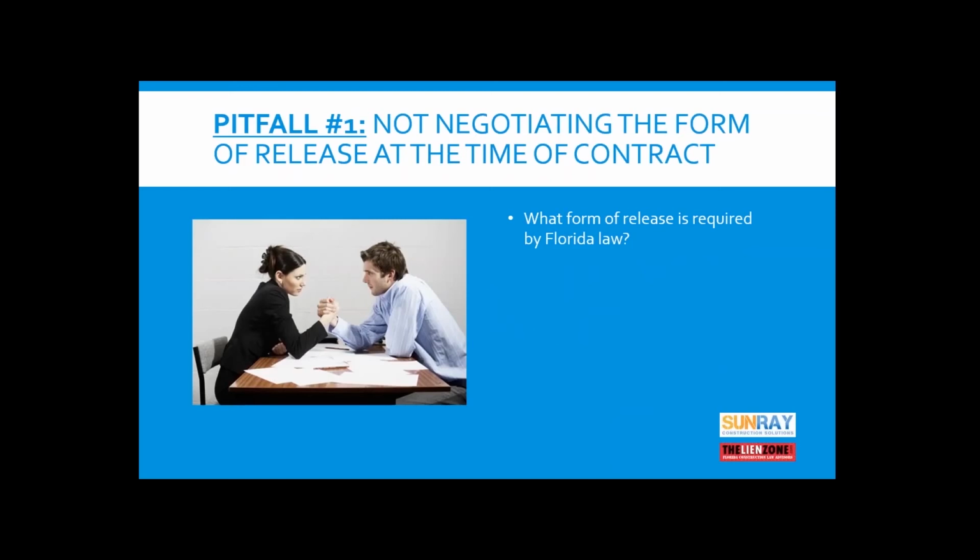So Florida statutes has a form of release. That release is very basic. The law says that no one can make you sign a release form other than that form that's in the statute. However, what is important to know is that if you sign a contract and that contract says that you will use the form of release prescribed by the owner or the contractor, or the sample form that you're going to use as part of the contract, that's the form you have to use.